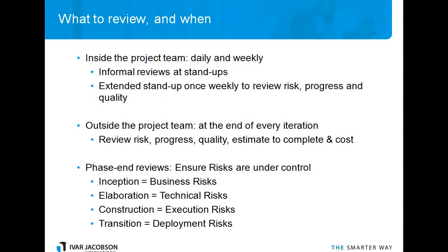So the kinds of things that you need to review within the project team, and I'll include the business representatives or the product owners, depending on your terminology, in the project team. So every day, have an informal review at the stand-up where everybody goes around and talks about what they accomplished yesterday, what they're going to do today, and any blocking issues so that you can clear out those quickly. So the business, through the business owner or the business representative or product owner, has visibility into that every day. They're a participant in that. They get to ask questions, and then they're working with the team the rest of the time as well.